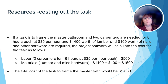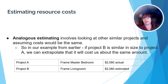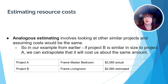In the example from the study guide, we have to cost the labor of two carpenters as well as the physical resources of the materials needed to complete the project. The human resource cost would be $35 an hour for eight hours for two carpenters, which equals $560. Physical resources are the lumber and nails at $1,500, making the total cost of both human and physical resources $2,060. Parametric or analogous estimating bases a current project's estimated cost on what it costs to complete a similar project, so we can assume costs will be similar for framing the living room as for the master bedroom, assuming the sizes are the same.